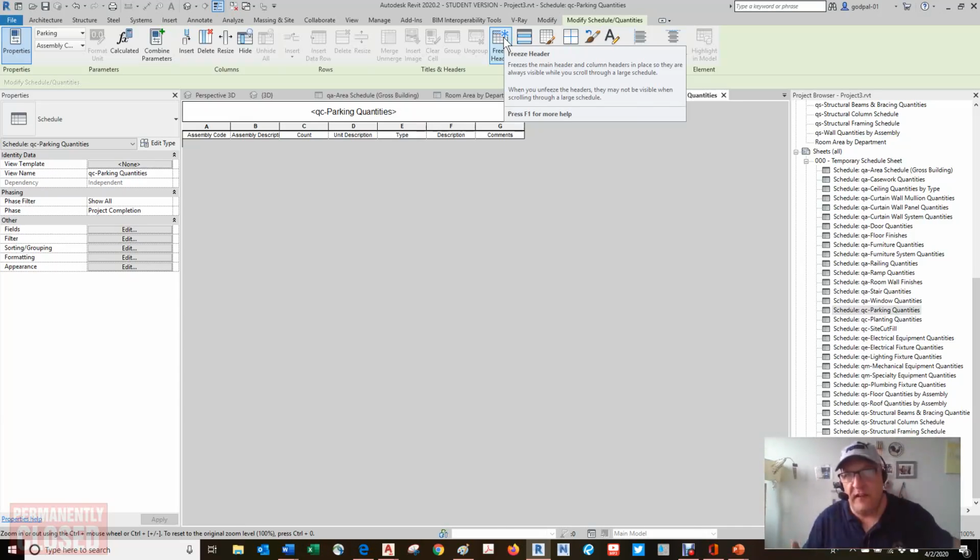If you make a mistake, there's liability. Change orders, retainage, back charges, all that. I'm going to back charge you for this. I'm going to back charge you for that. And the next thing you know, you're only really getting 85 to 76% of your contract value. And that shouldn't be the case.